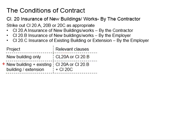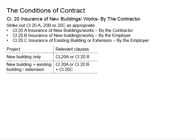In the case where the project involves a new building and there are existing buildings or structures within or nearby the construction site that may be affected, Clause 20C will be added. Under these circumstances, it will be either Clause 20A or 20B, plus Clause 20C. Having CAR insurance taken by both the contractor and the employer is not necessary, as one of them would be redundant.